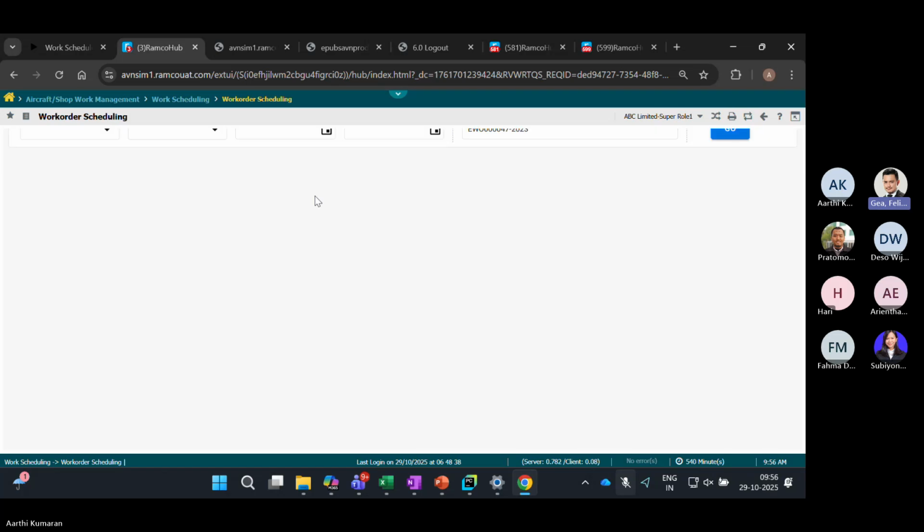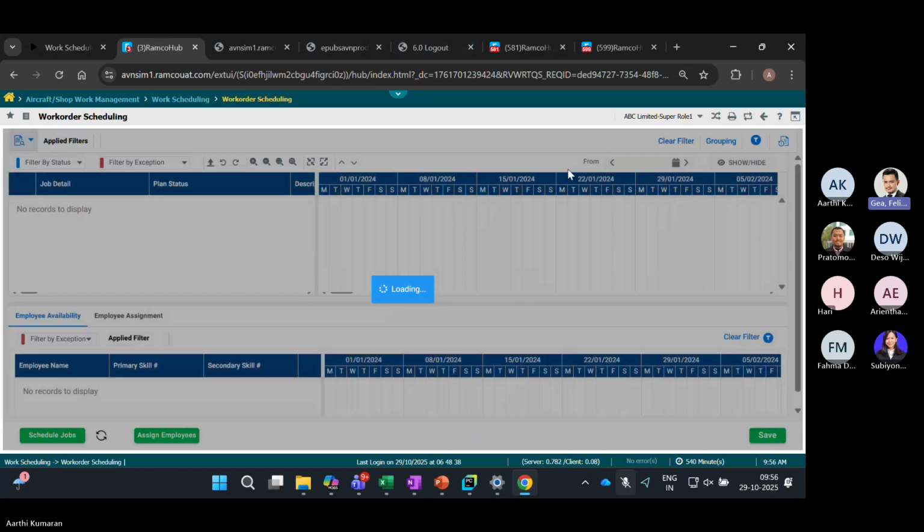So for manpower, we saw that tasks have a need for what manpower, what skill requirements they need, and we also saw at shop level what is available. What production planning essentially does is block the dates for each of these tasks based on the requirement and the availability. It matches every task's requirement, what skills are required, what license requirements there are, and compares that with the available employees in your shop and what licenses they possess. The mapping of manpower is done automatically by the system.